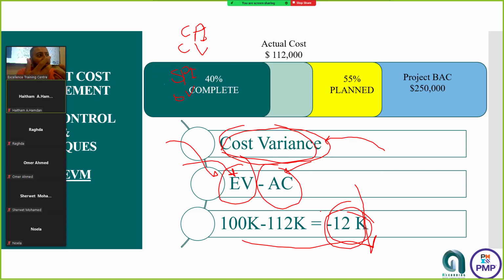Playing with the relationships between the activities and changing maybe precedence and logical relationships. You make things happen in parallel. You make something before something else, change something in the network diagram, and you will definitely avoid working on the mandatory relationships or the external precedences, right?